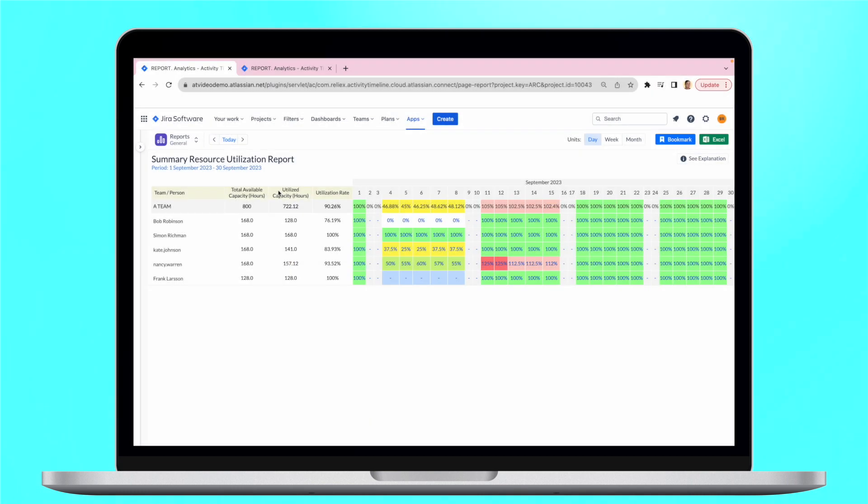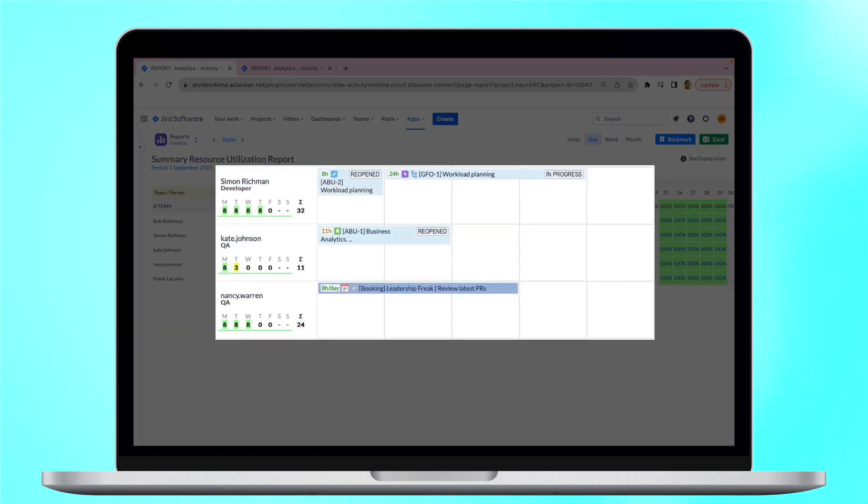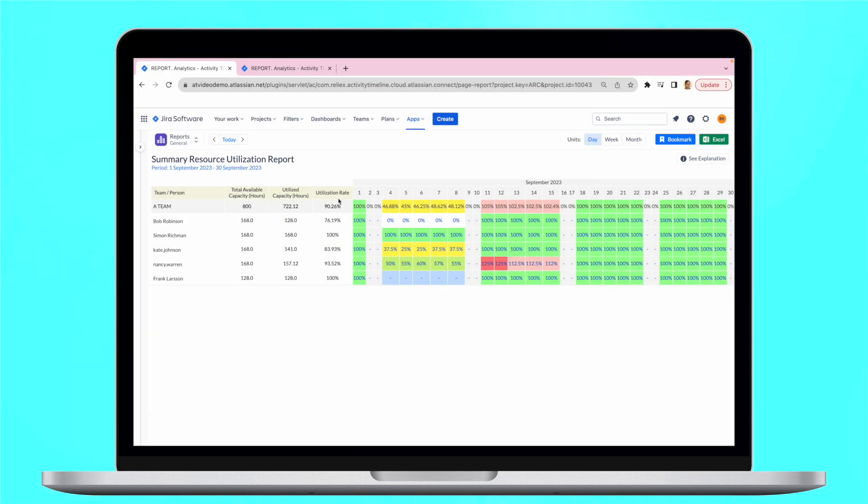We can also see utilized capacity in hours, planned time which is based on the remaining estimates of tasks assigned to the user, as well as bookings and placeholders created in Activity Timeline. We can also understand the rate of resource utilization.